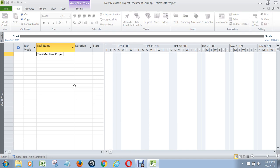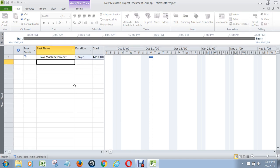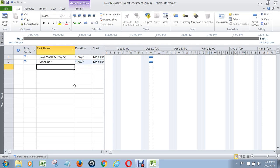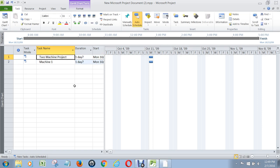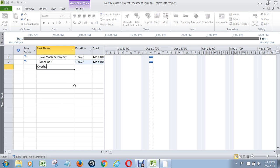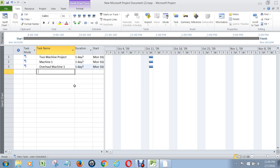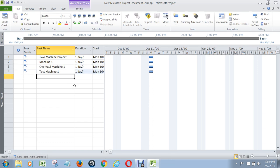I'm going to call this the two-machine project. This will eventually be our project summary task. Then I'm going to have all the tasks associated with machine 1 — that will also be a summary task to the project summary task. Here's where the actual work gets going: first thing we're going to do is overhaul machine 1, and then we're going to test machine 1. And then we're going to put in a milestone here that machine 1 is complete.